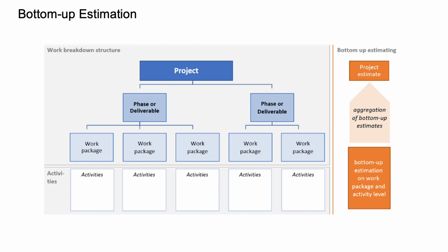Do you remember WBS, or work breakdown structure? I'm sure you do because you are great. So the bottom-up technique aggregates the duration of all activities, work packages, and tasks in order to calculate how long the project will take and how much it will cost.